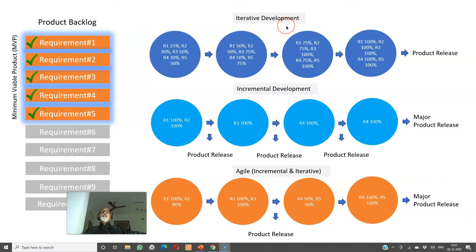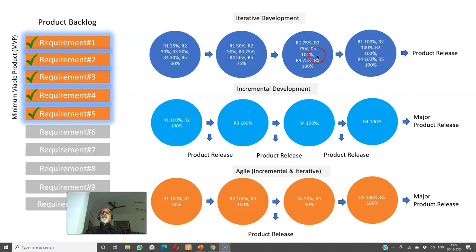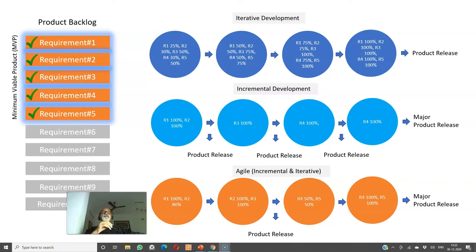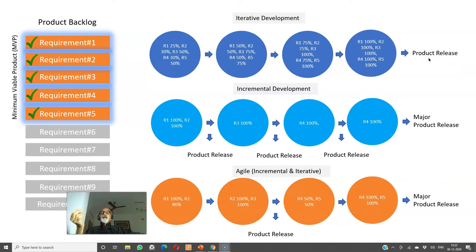Now requirements one to five are part of my minimum viable product. If I'm following an iterative development model, I start working on all the requirements ranging from one to five. I make some progress in iteration one, give a demo, collect feedback, and incorporate that feedback into the subsequent iteration. You will see the percentage of completion increase. Then again demo and feedback, again increment the percentage complete. You work on the features and make a little more progress. Maybe in iteration four, I complete all the features 100 percent and make a release at the end of iteration four, which has features one to five constituting the minimum viable product. The key thing in iterative development is the release is always a final big bang release at the end of the final iteration.